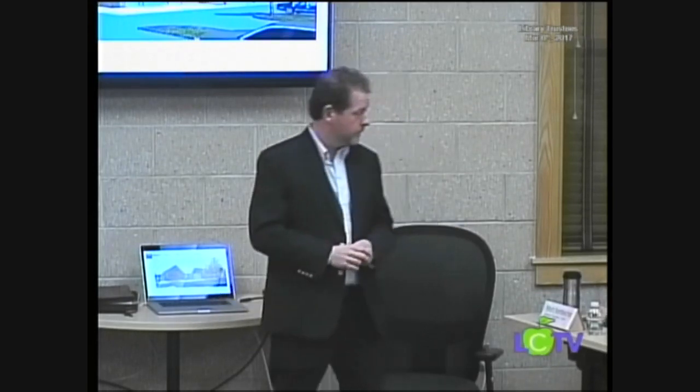Yep, thank you. So as a point of clarification for folks, in May at town meeting, there's a warrant article for the library. It has three parts. One is that the town votes that the trustees accept the grant that we put in for the reimbursement money from the state, and you accept the schematic designs as presented. Now, obviously, as we've been through this, we can change the schematics before we actually do construction. The third part for the warrant is that you accept building on the slope site. Basically, that's a land transfer from the school department to the library trustees for the purposes of building the new library. If the new library doesn't go through, it will revert to the school or the selectmen or whoever the controlling board is at the time.